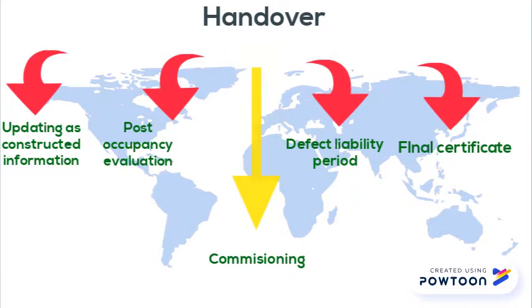Handover is previously known as post-practical completion. It is the process of handing over the building, which is the conclusion of the contract. It includes updating as-constructed information, post-occupancy evaluation, commissioning, defect liability period, and the issuance of the final certificate.